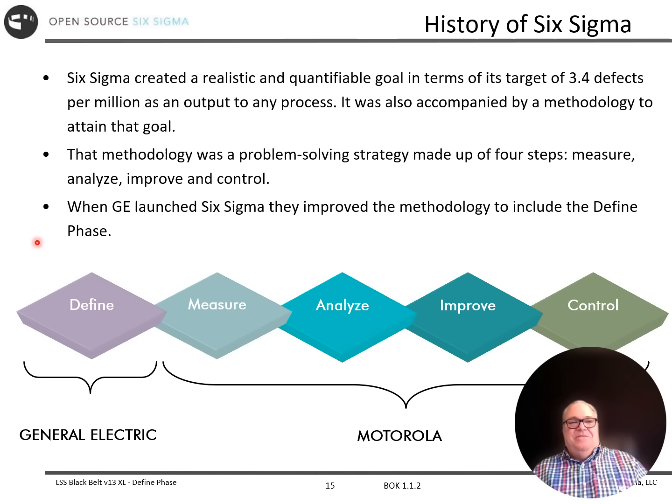And the whole reason was, hey, we need to do enough definition of the projects at the beginning to decide which ones we're going to go to work on. So we're going to have this portfolio of potential projects, and then we're going to go launch those through the rest of DMAIC based on the ones that we think have the most return on investment.